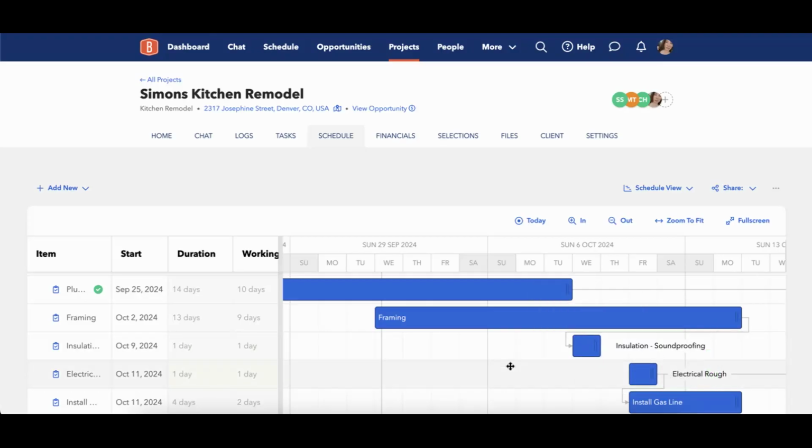Now, one of the things you'll notice is because this is a fixed mode schedule, it was not designed to move that task to butt up to this. And again, that is by design. So of course, if you don't want to go through and drag things back, then you can create dependencies in the schedule with that lag time already installed.